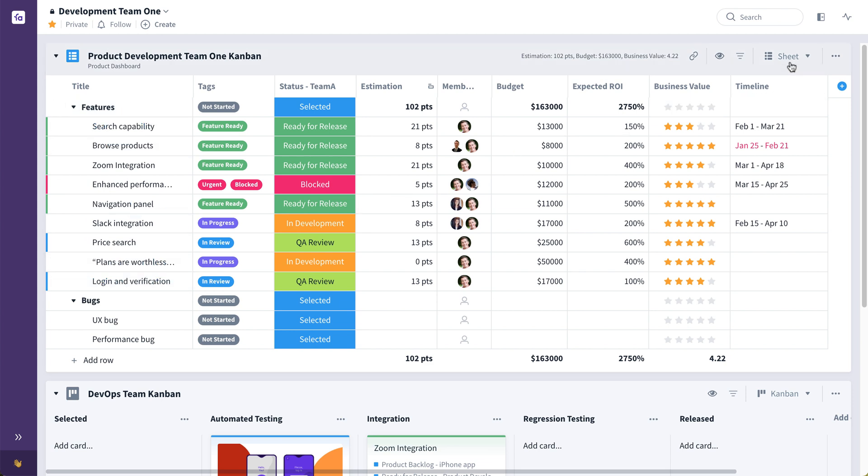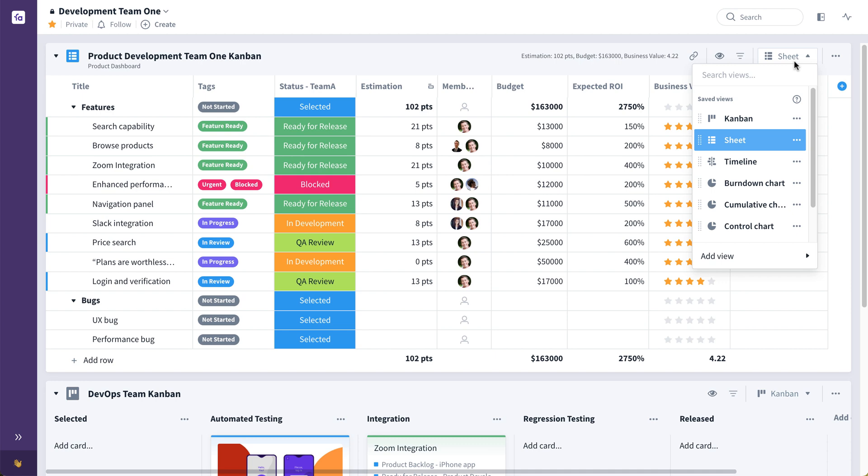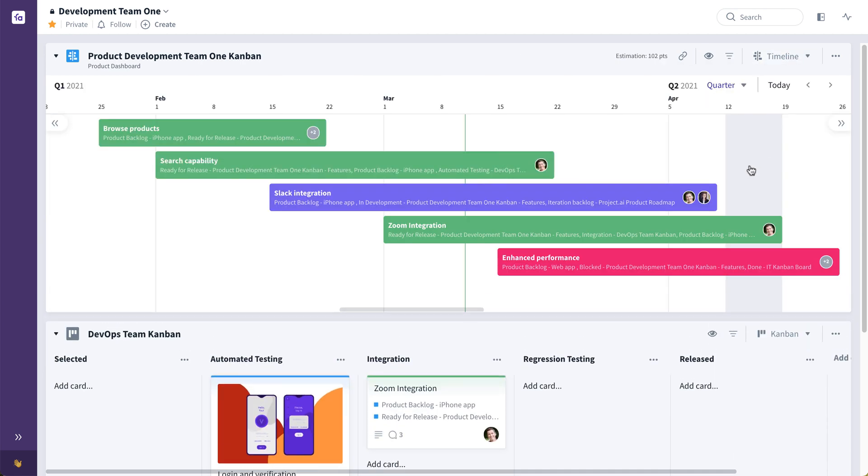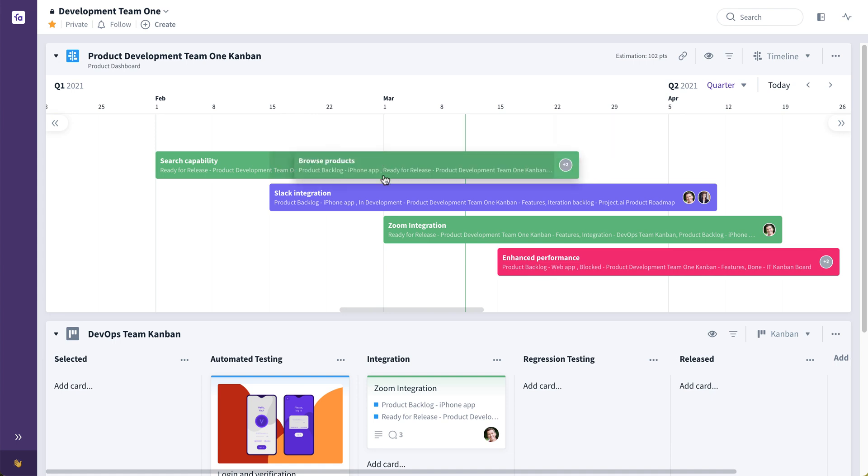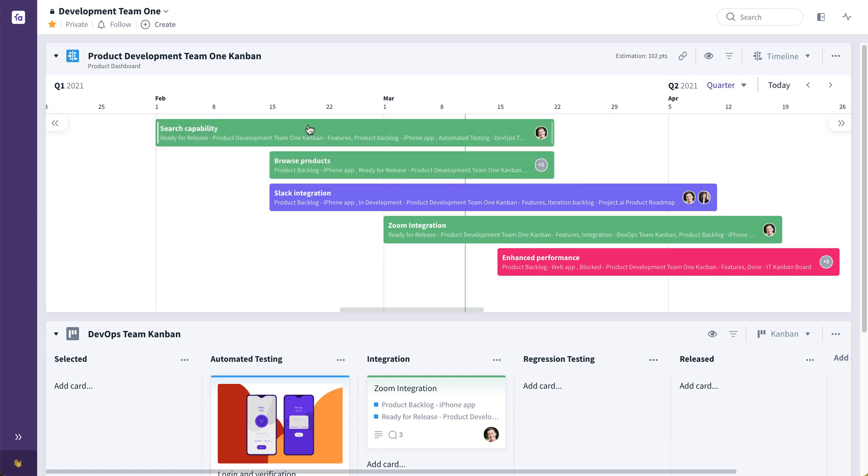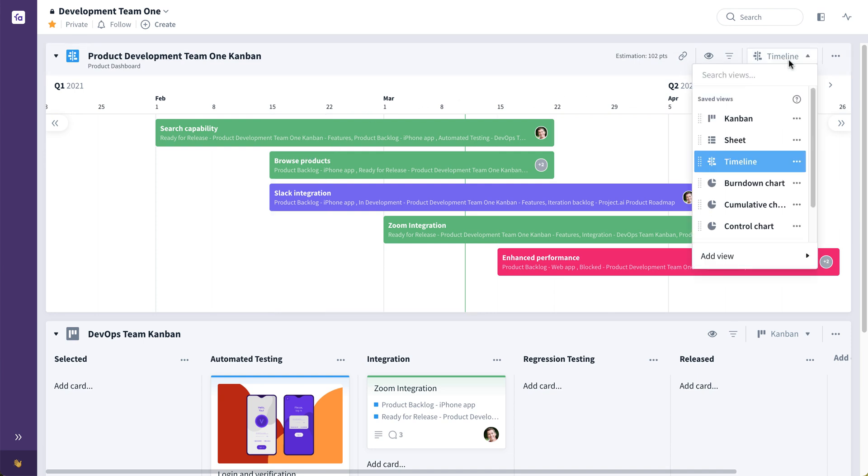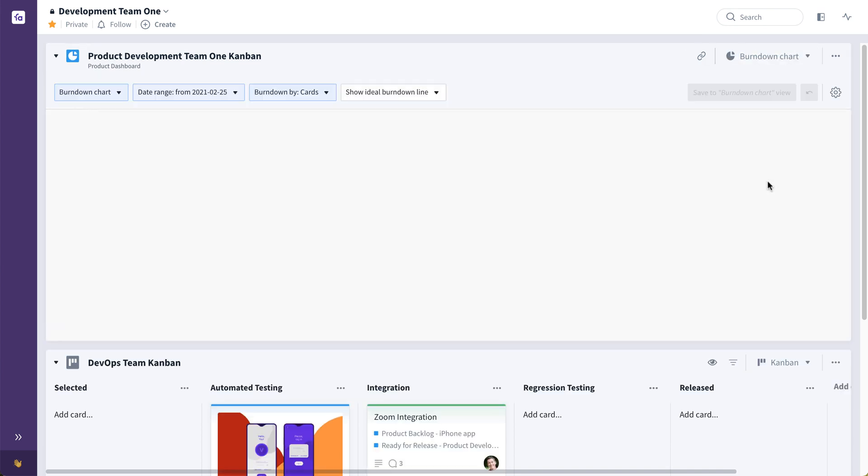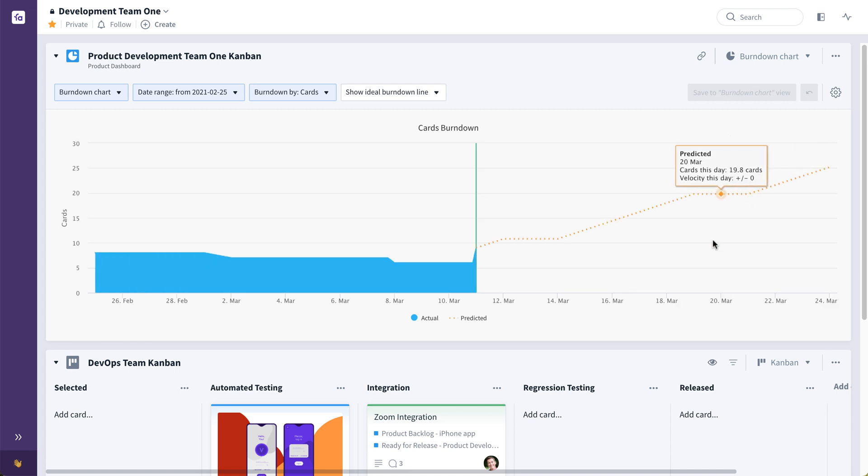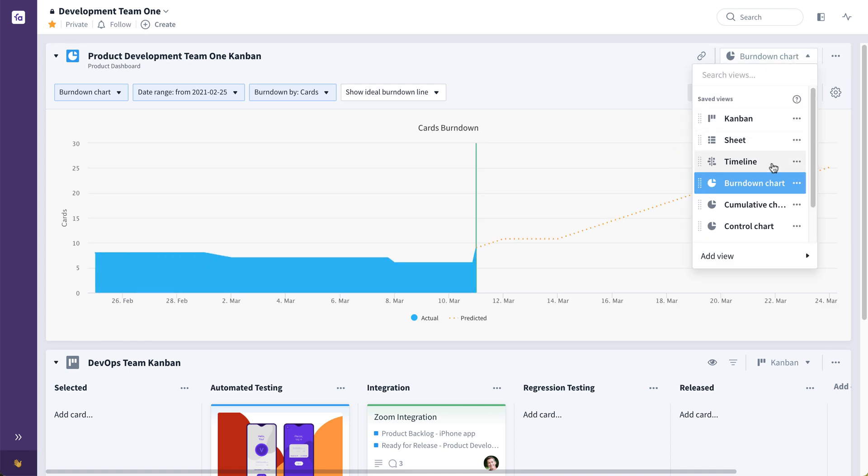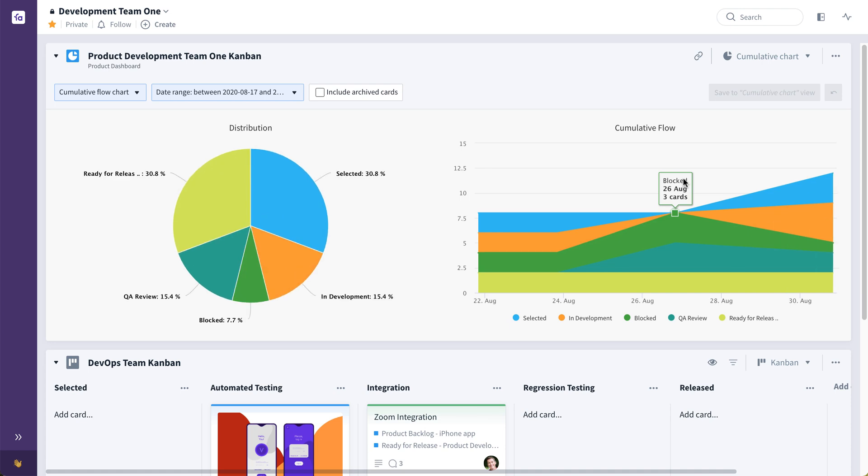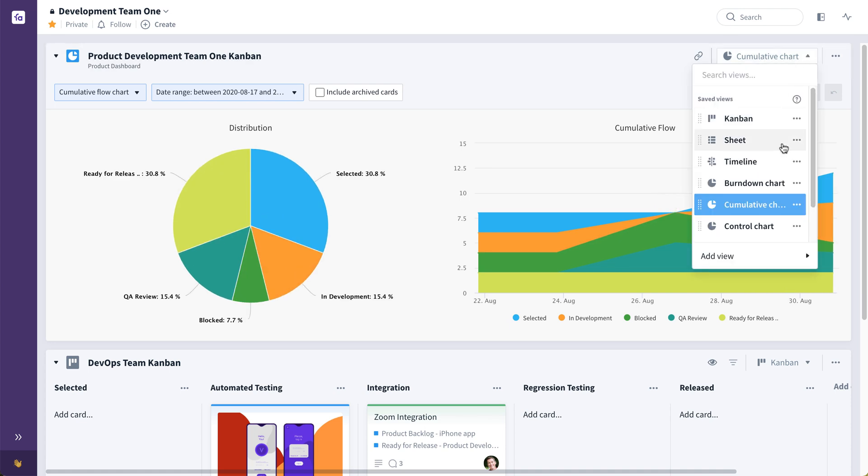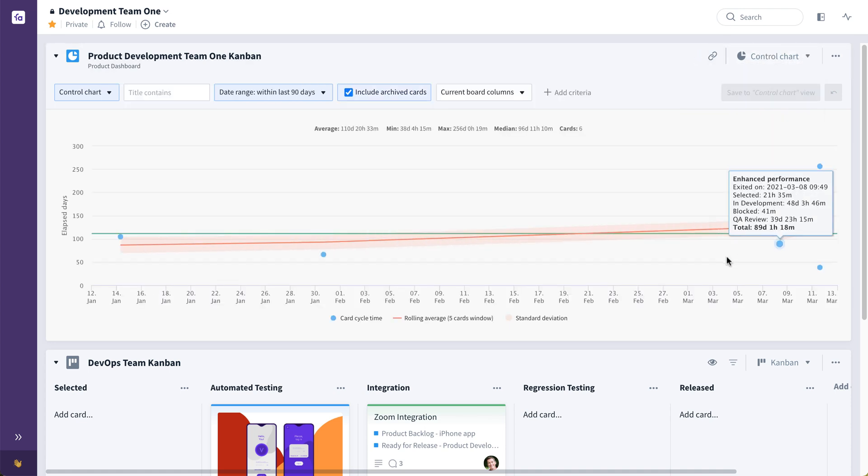Or you may choose to look at things in a timeline or roadmap view, like so, where you can drag and drop these same cards on a timeline, changing their dates, start and end dates, reorganizing them any way you choose. There's also intelligence built into the boards. This team may choose to track progress in a very visual way, maybe via a burndown chart like this, or maybe a cumulative flow diagram like this, or even a control chart like this.